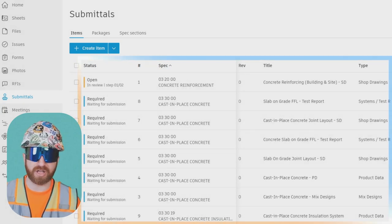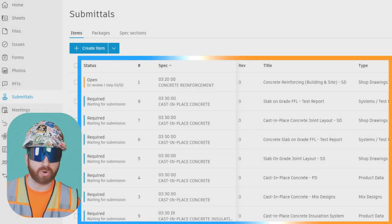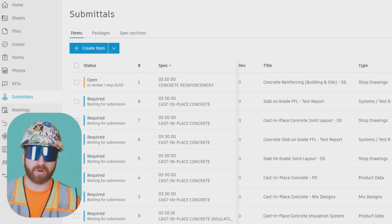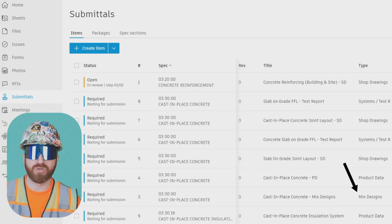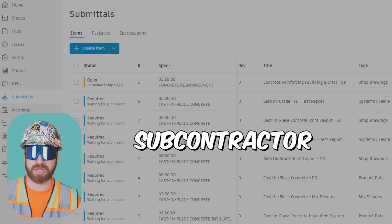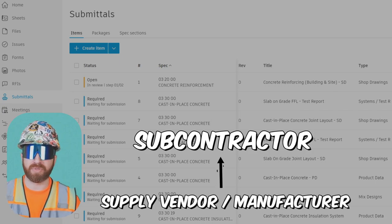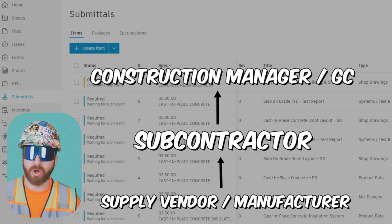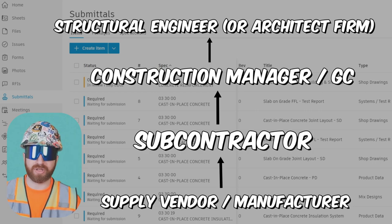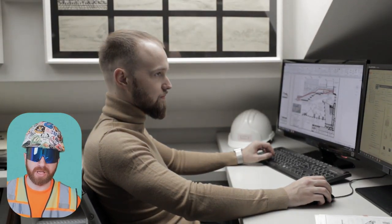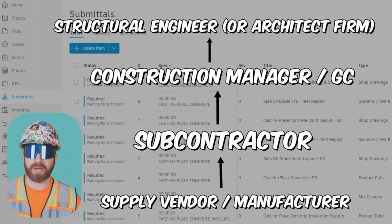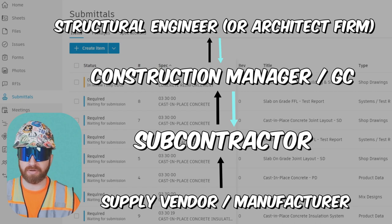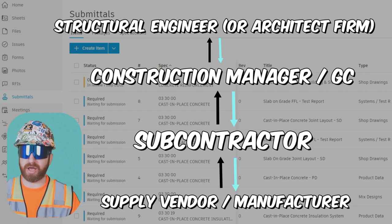For example, an installing and finishing concrete subcontractor needs to order concrete mix through a concrete supplier. The specification section may require a mix design submittal to be submitted to the structural engineer. So the subcontractor gets the mix design submittal from the concrete supplier, then submits it to the construction manager or general contractor, who then submits it to the structural engineer. The structural engineer reviews it, can either approve or reject it, and then it goes back to the construction manager, then back to the installing concrete finisher, and then back to the concrete supplier.